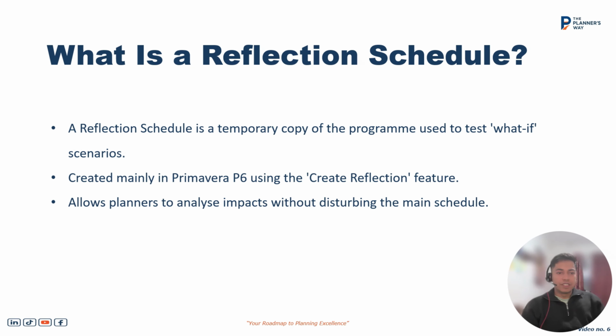Starting with the basic definition, what a reflection schedule is. A reflection schedule is a temporary copy of a program used to test what if scenarios. We can use a reflection schedule to calculate different what if scenarios. What if we change this one, or else we change this one? In those situations we make a temporary copy of a program, or we create a reflection program and make changes over there rather than amending the original program.